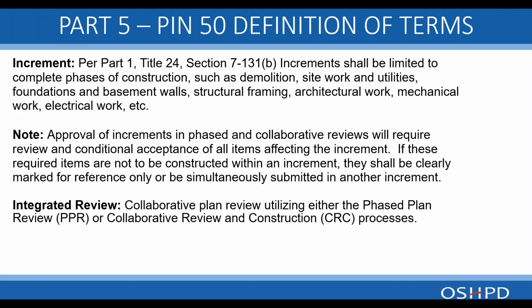The increment phases such as demolition, site work and utilities, foundations and basement walls, structural framing, architectural TIs, mechanical work, electrical work, etc. Those are all considered phases which could be broken up into an increment.